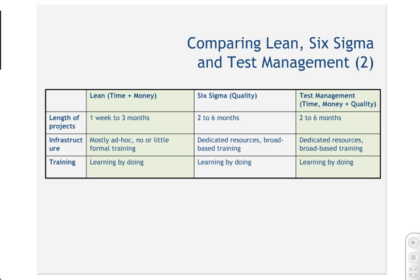Between every phase in that cycle there's a toll gate. At the toll gate you will validate the business case for the improvement. So that's a lot like PRINCE2. In each stage there you validate the business case as well. Should we go on or do something else? I think it's very wise to do it like that.